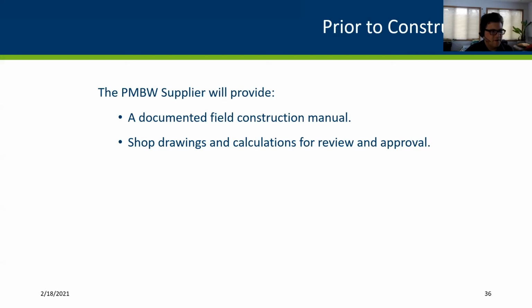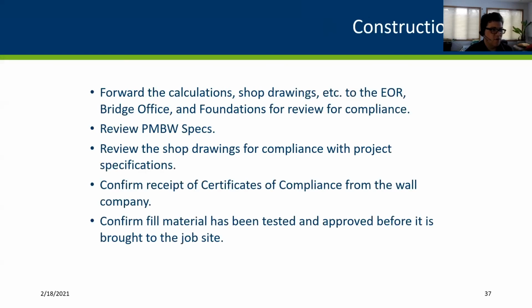And much like MSE walls, those will need to be forwarded to whoever the engineer of record should be, whether that be an in-house project or if they hired an engineer to put this together. Our office then looks at them. Typically that goes through me, and then the foundation's office will need to review them for compliance as well. So those need to be forwarded. The PMBW spec is very similar to the MSE spec, but there are differences, so you should be familiar with those special provisions.